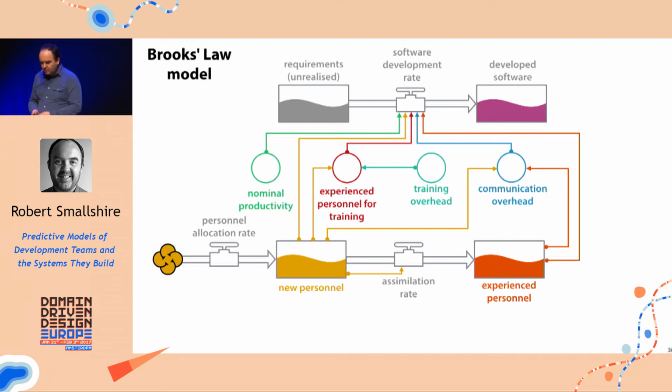Okay. So now we need to get to the core of what I think Fred Brooks was talking about, or hinting at, which is that as we add people to a project, it takes longer. Why does it take longer? Because there are more people, right? Why does having more people make things take longer? Because they all have to talk to each other, right? And that's not linear, is it? Right? Having 4 people in a project doesn't take 4 times as long. There isn't 4 times as much communication as having 1 person, right? There's a lot more, because obviously 1 person can't communicate with anybody.